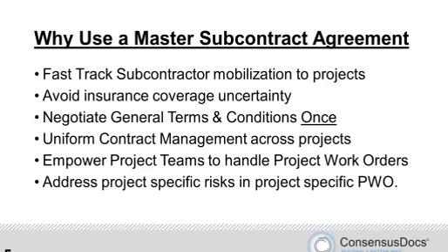And those are great points, Brian. I would just like to emphasize that through Kevin's expertise in contract drafting, the Consensus Docs 756 project work order is structured in a way that it functionally will avoid a lot of those potential problems, because there aren't 10 or 12 pages of additional verbiage where you might find folks wanting to cross things out, add things in.